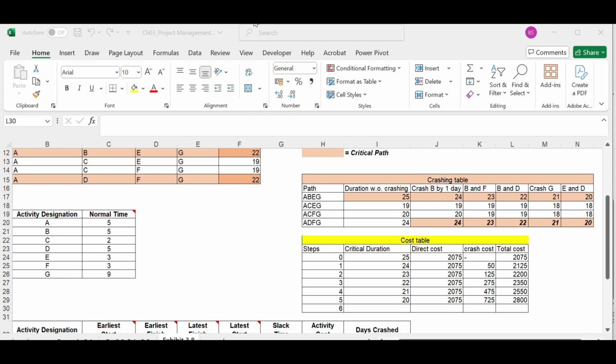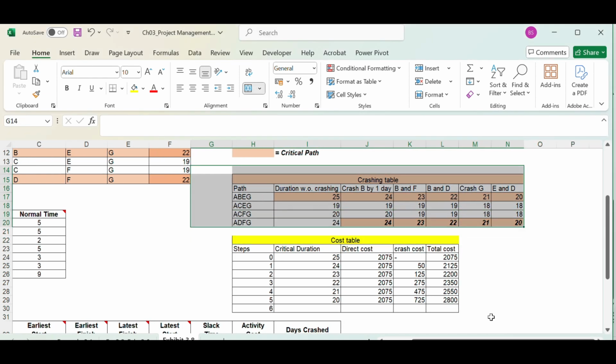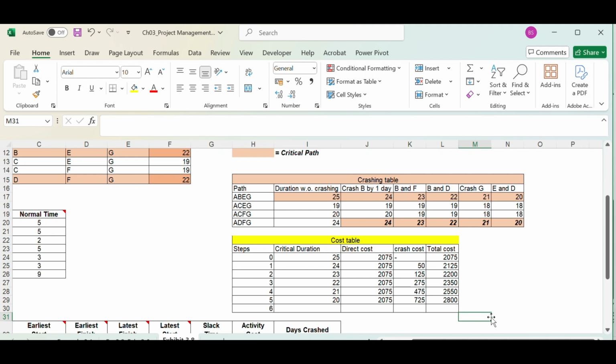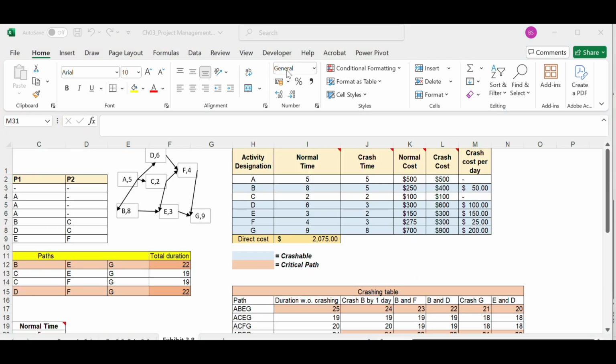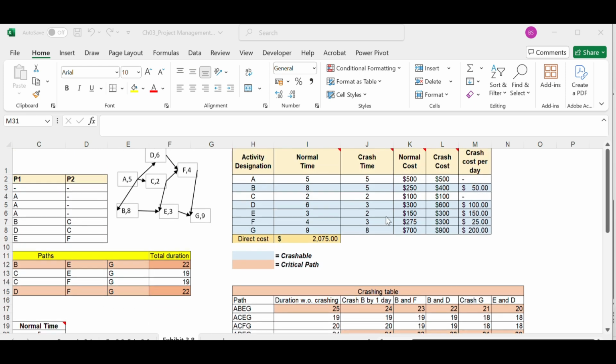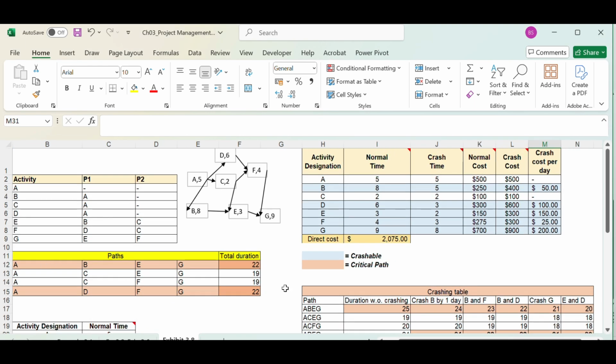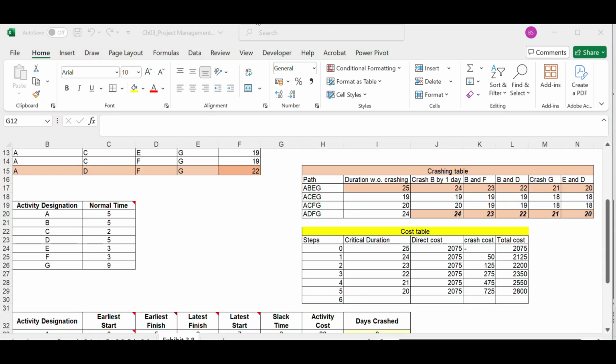A full crash schedule is the schedule like this. We will have two tables like this indicating the time and the cost, and it talks about the project in a situation where it cannot be crashed beyond that point. For example, in this project, after this point, we cannot crash this project further because after crashing from this point, the project won't be crashed on both the critical paths. Only one critical path can be crashed at that time. So that is not justified.